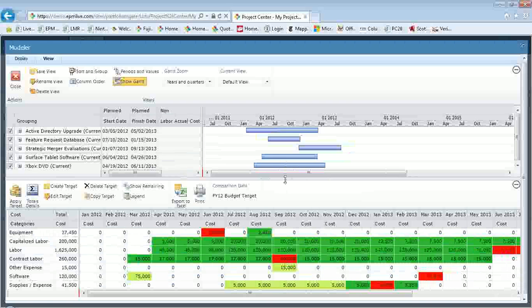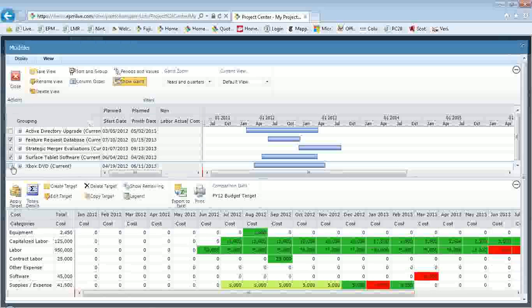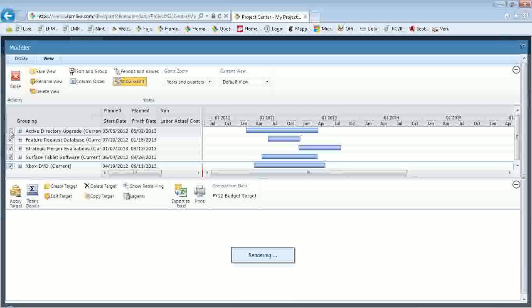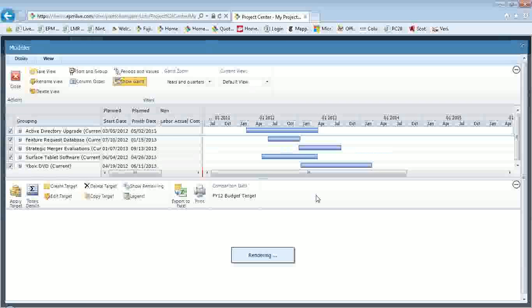So what you could do at this point, the very first thing you could do is, well, if I obviously don't do the project, can I come in line in terms of my budget? That gets a little better. Now, that's not always an option. So what you can do is reselect, and the second option is, can we resequence these into a time frame that is more workable? And that also supports our budget.